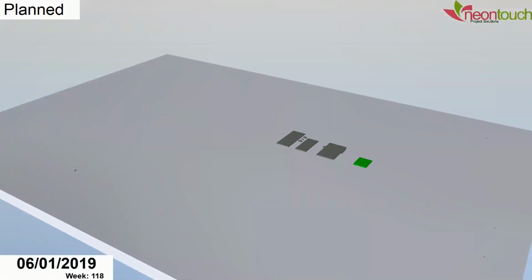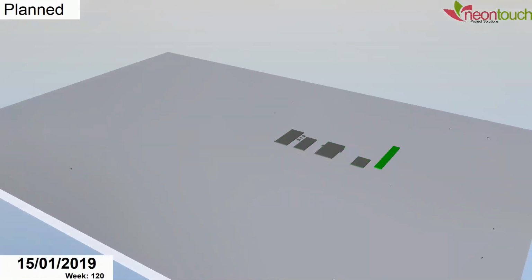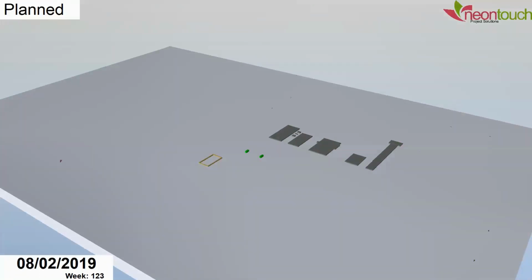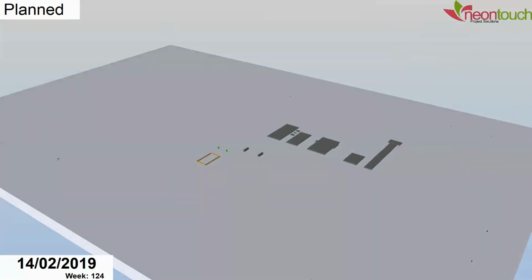And now the civil foundations are going in, equipment foundations are going in, just like you will expect in any major project. The civil works will be done first while you are fabricating most of the equipment off-site.